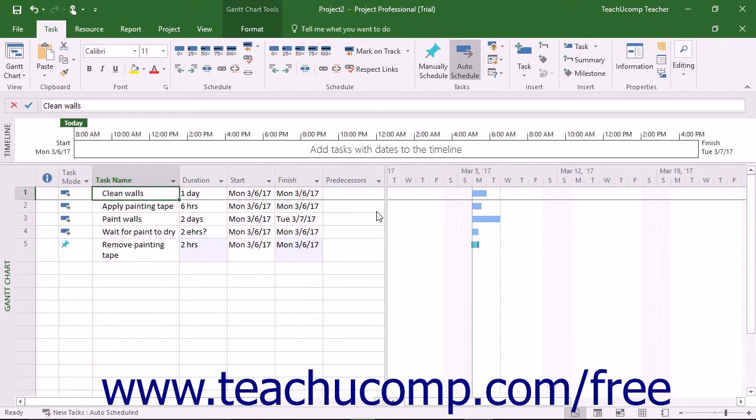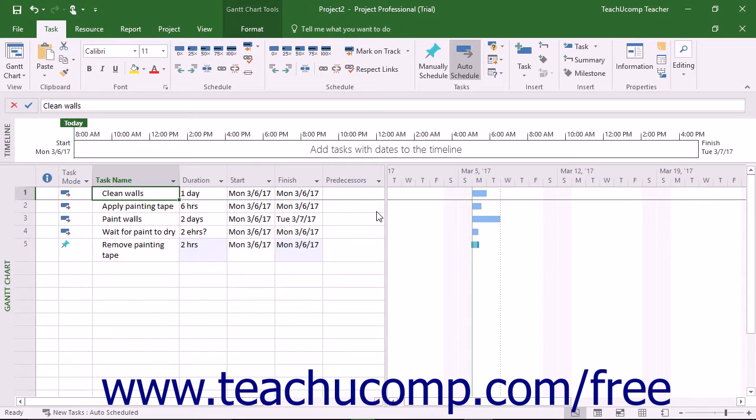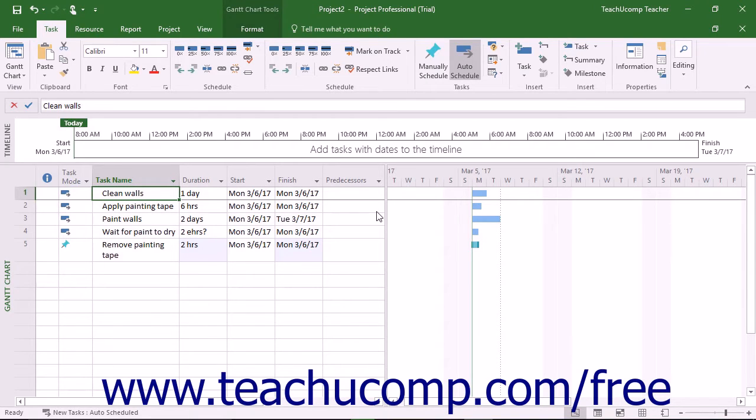With a Finish-to-Start link, the dependent task's start time is linked to the predecessor task's finish time. The Start-to-Start link makes the dependent task's start time the same as the predecessor task's start time.